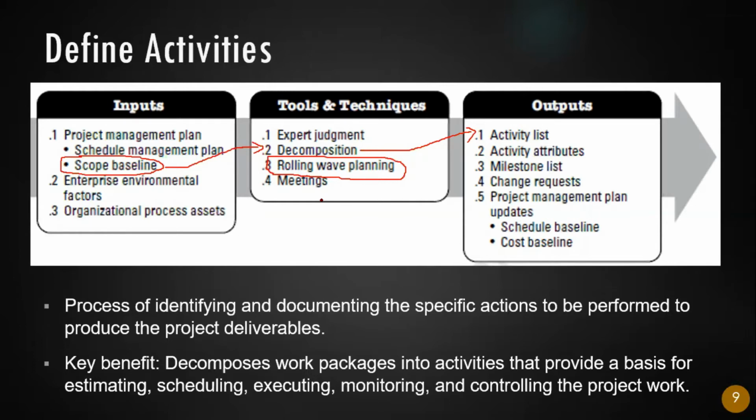So you leave aside the 10% and just focus on the 90%. For the 10%, as information comes later, you then do the development or work on those features or requirements at a subsequent time. Okay, so that is called rolling wave planning.